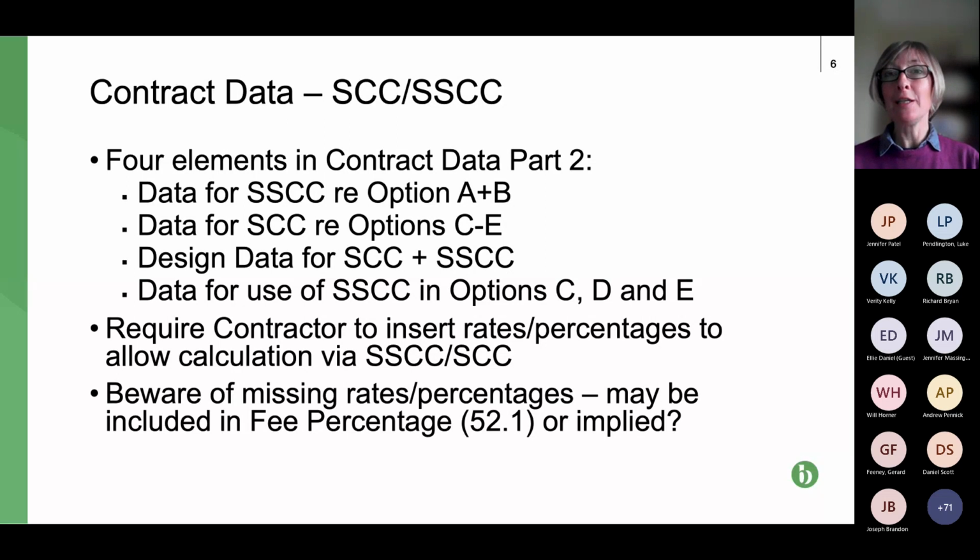What we would prefer it to say, if it was going to help subcontractors and contractors, would be to say, well, the fee percentage covers certain items, overhead, profit, and maybe 2 or 3 others. But for anything else that isn't covered in that fee percentage or in the schedule of cost components, the contractor or subcontractor gets paid its reasonable cost, for example, but there's nothing in NEC that says that. In fact, it's the opposite, because the default position is if it's not covered in the schedule of cost components, then it's deemed included in the fee percentage. Next slide, please.